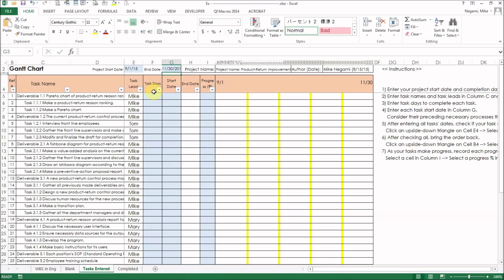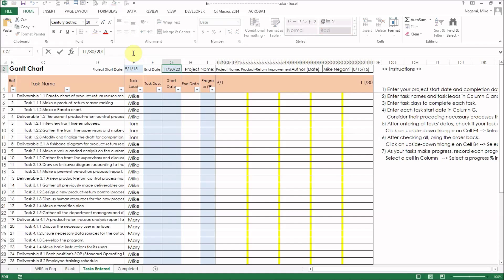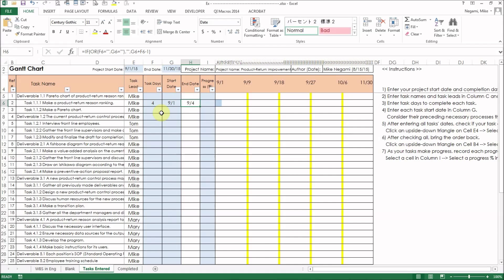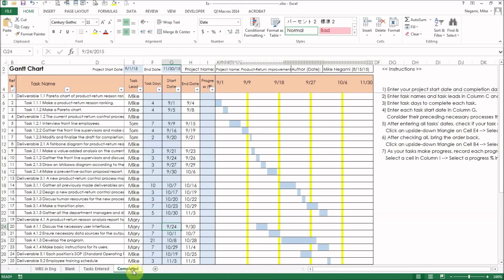Next, enter your project's start and end dates here. Then these dates will appear on the chart header automatically. Enter each task's work days and start date in the next cells. Then each task's end date and the dated bar will appear. Repeat this on all tasks and it will look like this.